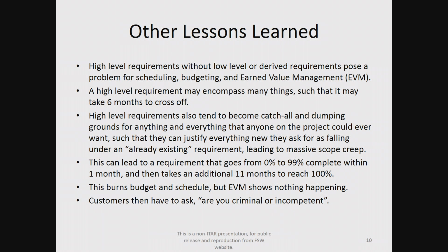And so also these high-level requirements sometimes become catch-alls for a system, whereby anything and everything anybody could want falls under this requirement. And so there can be a case where it takes 1 month to go from 0 to 99%. Then we sit at 99% for another 11 months with customers asking, are we criminal or incompetent, because we keep charging all this, but it looks like nothing is being burned down.